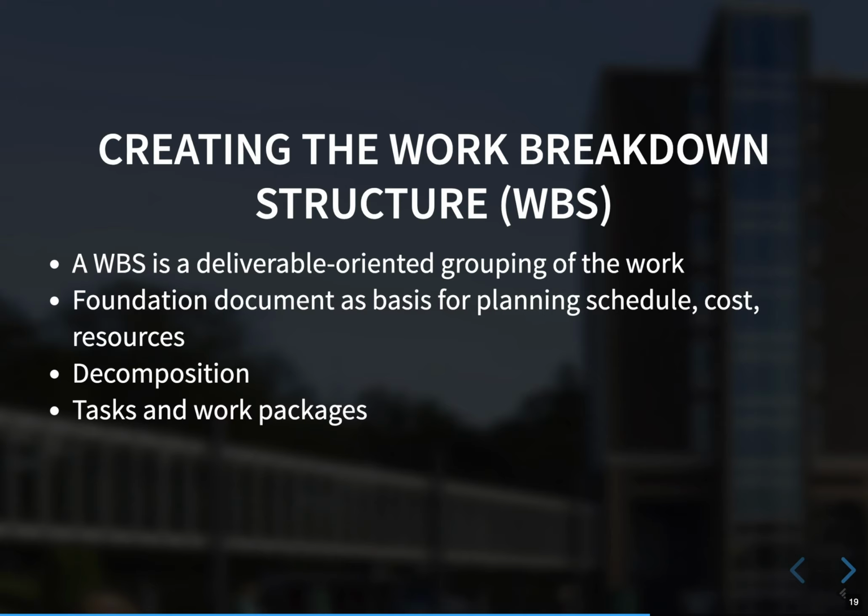The scope baseline then includes the approved project scope statement and its associated work breakdown structure and the work breakdown dictionary. This is what you call the scope baseline. After you finish creating the work breakdown structure, the work breakdown dictionary, and the scope statement, you have a starting point, which is your scope baseline for your project. Yes, it can change later in the project, but first of all, this is your start, and you measure against your scope baseline during your project.